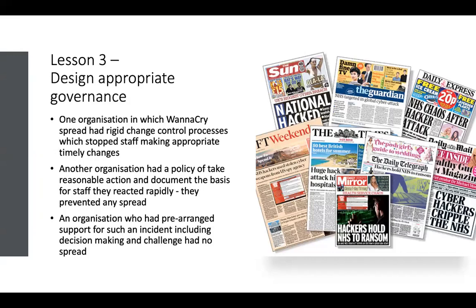In the lessons learned, we looked at that and they said, well, we had to follow our change process. We had to get senior sign off. And actually what they had was a one-size-fits-all governance, which potentially is not actually fit for purpose for emergency changes or for an emergency situation. What's interesting there is how empowered people actually feel to make a decision that the governance in front of them is not fit for purpose in an extraordinary situation. They either need to feel that they can flex that governance and have the ability to do so, or have something outlined to them about how they deal with extraordinary circumstances.